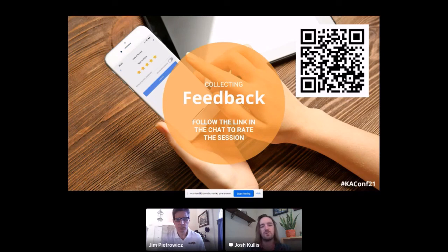Typically, throughout the life of a seed project, the engagement starts off with a weekly meeting. There may be an hour or two outside of that weekly meeting where the customer really needs to engage. Our team will come in and set up an initial configuration. A seed project typically takes about 15 weeks, though we've done them shorter, some completed in 2 weeks, and some that run 20, 25 weeks. We generally don't recommend the longer ones because we want to show value in a shorter amount of time. But as the project goes, that time commitment starts to flip.